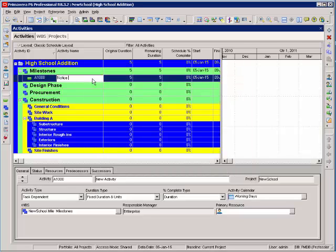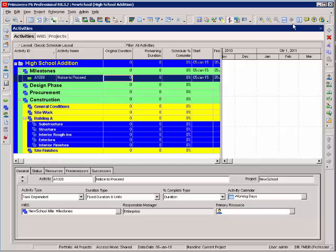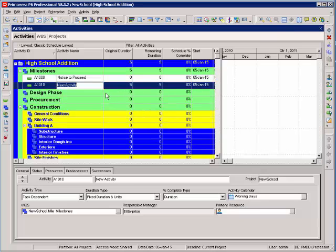Notice to proceed. I've got a zero duration. Now, to add the next activity, I can either hit the plus sign or I can select insert and type substantial completion.